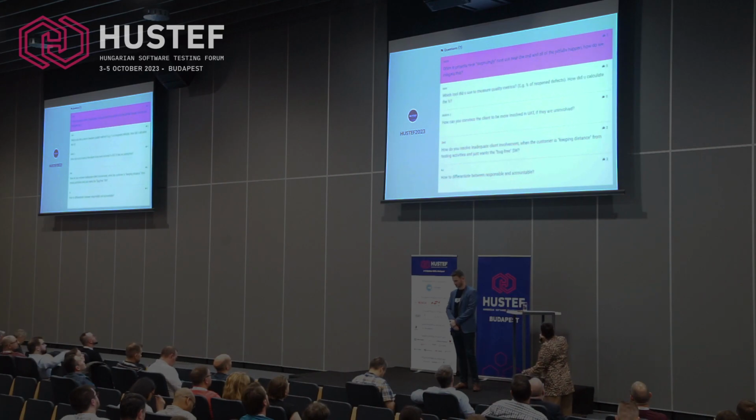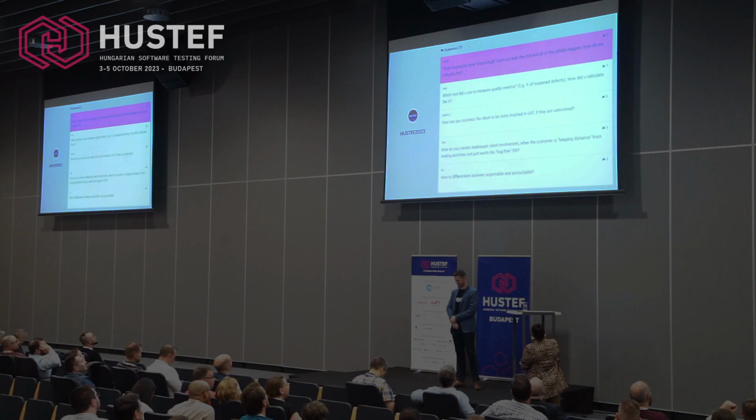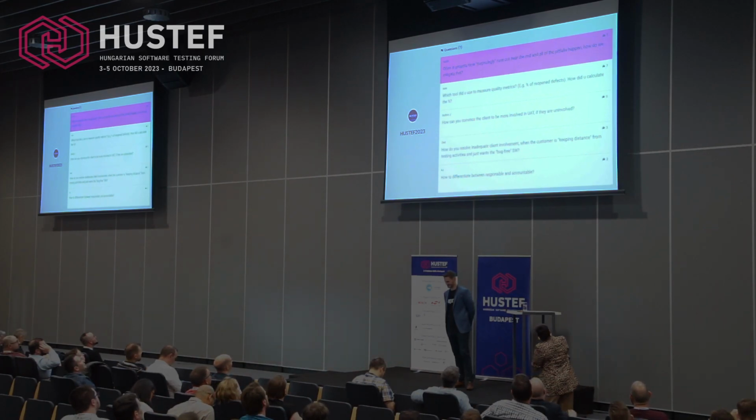Often in projects, time runs out near the end, and all of the pitfalls happen. How do we mitigate this? Yeah, it's a really good question. Usually one mistake can be that UAT should not be planned at the end of the project.